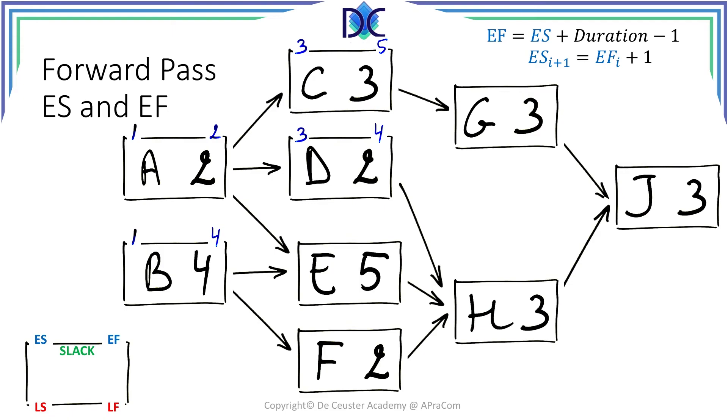And now we see the early finish dates for the predecessors of activity E. Both of them have to be finished so we look at the highest number and B is determining the start time of activity E. It is only when B is finished that E can start. So E can only start on April the fifth. Again, 5 plus 5 minus 1 means that E can finish on April the ninth.